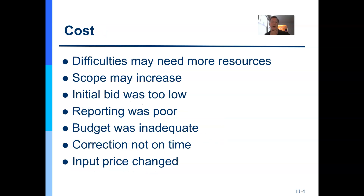Same with cost — every time I do this, I'm updating costs. One of the things I like best in a monitor and control perspective is doing bottom-up estimating early on. With bottom-up estimating, it gives me accurate costs for items remaining and super accurate costs for items closed because, well, they're closed. Love bottom-up estimating.